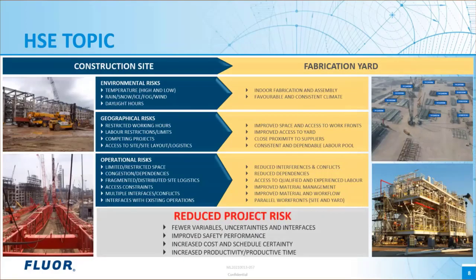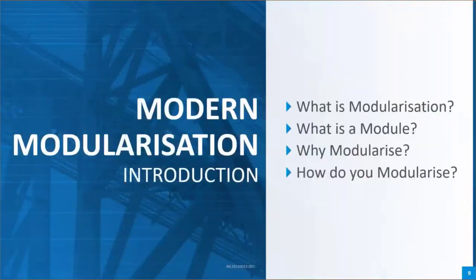We refer to these risks as influencing factors, and they help form the business case for modularization. Modularization can target and address these sources of risk by transferring work to a location where their presence and strength is significantly lower. For example, instead of working outside in changing, challenging, and difficult weather conditions, work can be moved indoors where the environment is sheltered and can have improved access. Modularization helps to lower project risk by reducing the number and scale of variables and uncertainties that can negatively impact project performance.